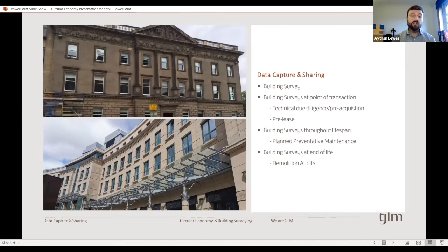So our work would always start with a survey to understand the building. So in this case, we would be using a planned preventative maintenance schedule, a PPM, which schedules the elements, describes their condition, their repair needs, and gives a cash flow to help the client budget. From a cyclical perspective, this work means we're looking at a lot of the Anthropocene every day.